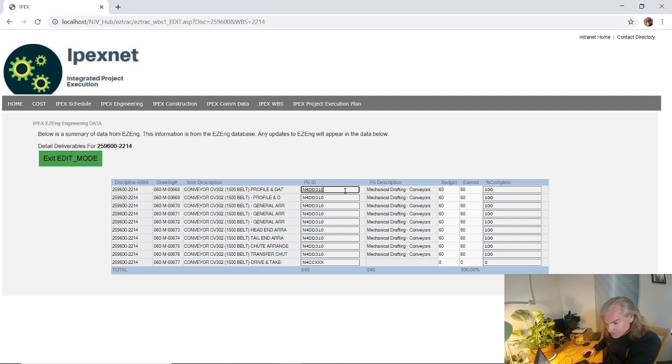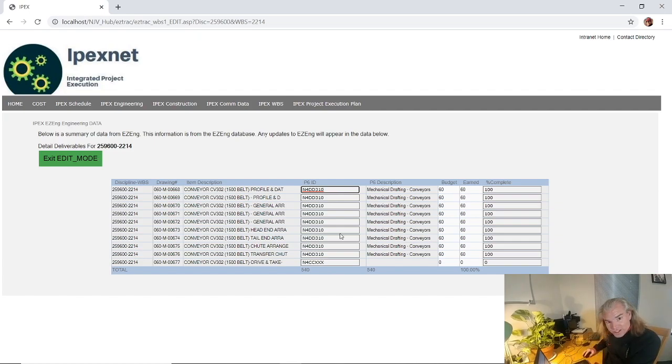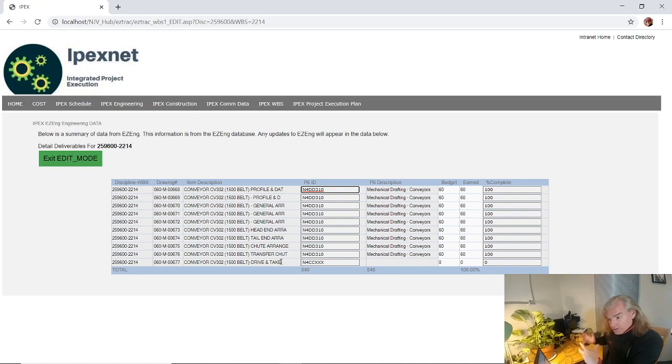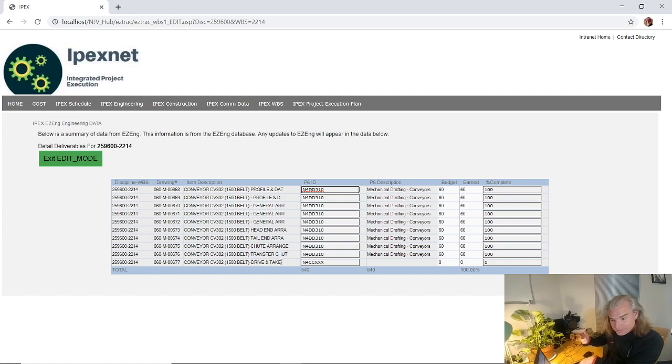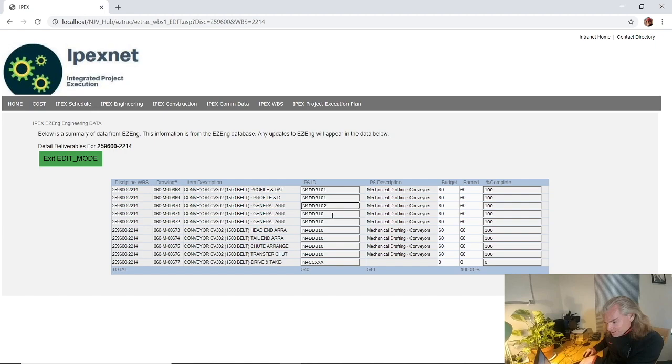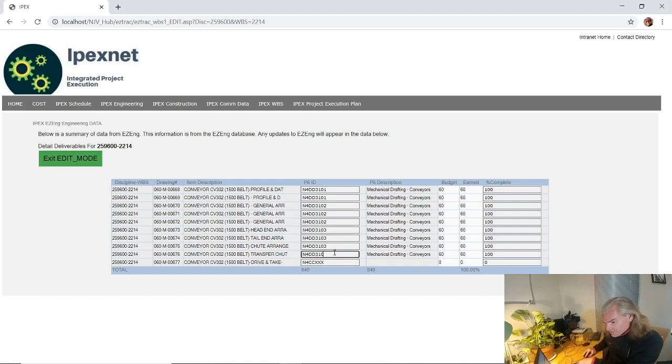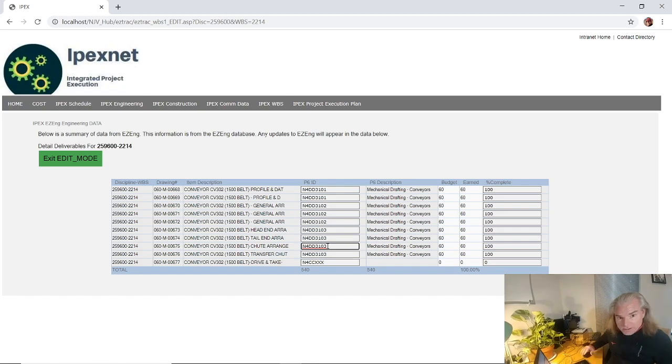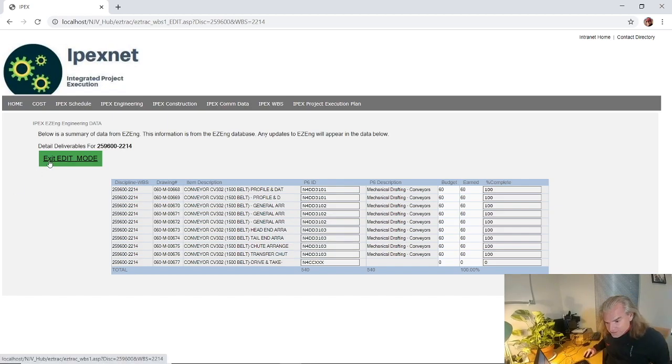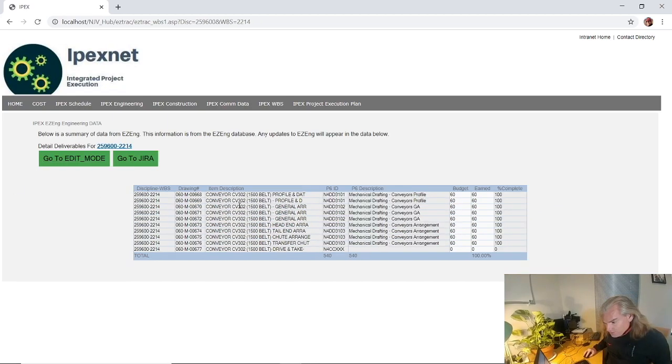For our schedule IDs, maybe we want the plan and profiles on one ID, maybe you want the general arrangements on another, and maybe you want all the other arrangements on a third activity underneath that WBS. In this case I've already pre-loaded it. I've added a one for my plan profiles, we get twos for the general arrangements, and threes for the rest of these guys. All that's automatically saved in our database.